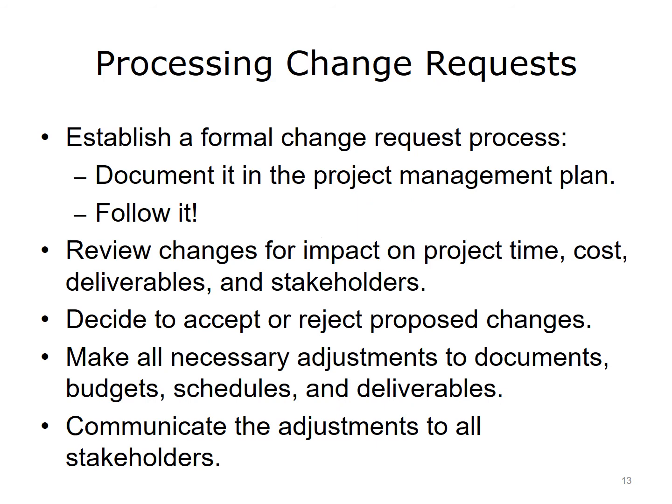These change request processes do not have to be elaborate, but they do need to be clearly defined procedures for accepting and vetting requests for project alterations. The process will need to determine the impact of a change on project time, schedule, cost, and deliverables, and include a formal procedure to accept or reject it. Or your customer organization may have such a process in place that you can adapt for your project.